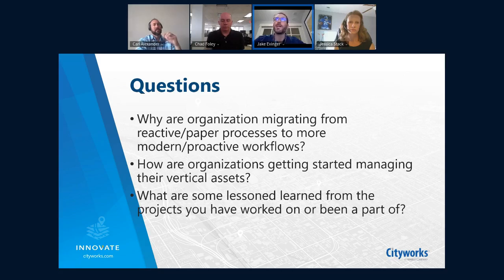So many times when we get engaged, we're being asked to capture data for a particular business unit in a customer's office or for a particular workflow. But getting approvals, getting on site, and having permission to be in certain spaces requires many different business areas to participate in. So logistically, it's a lot more work than you think.